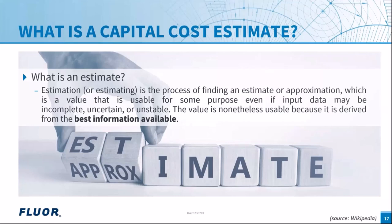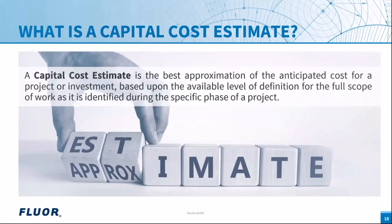Combining both definitions, a capital cost estimate is the best approximation of the anticipated cost for a project or investment, based upon the available level of definition for the full scope of work as identified during a specific phase of a project. Early in the project the estimate may be less accurate, but it is still based on the best information available at that time, giving us the ability to always produce an estimate.